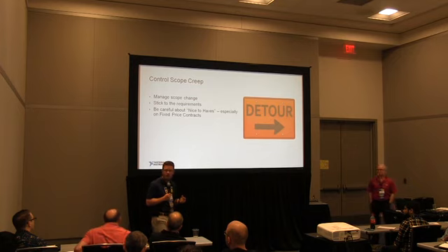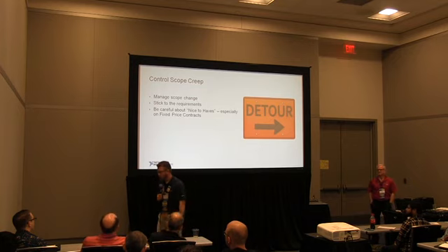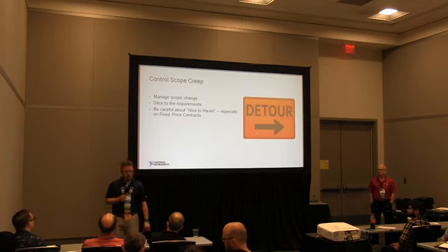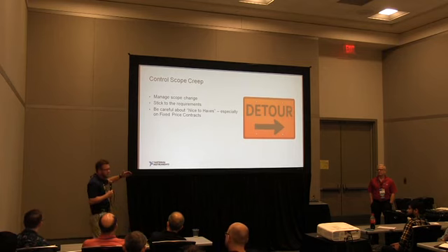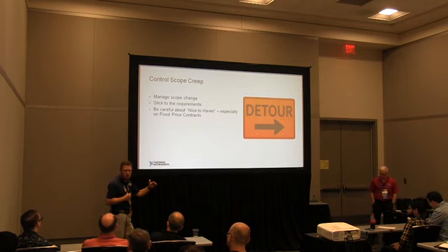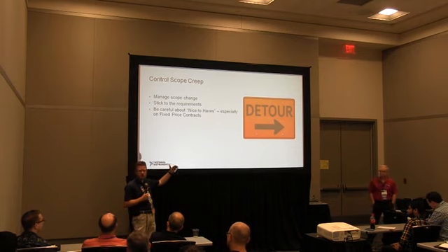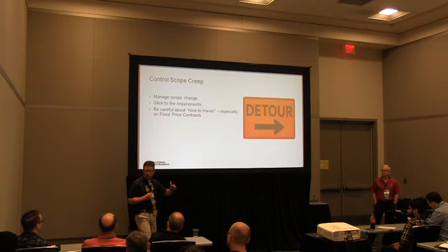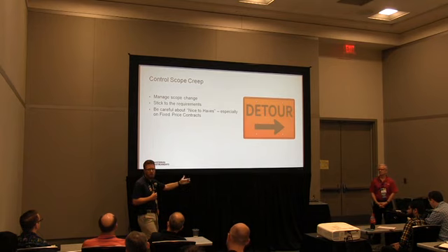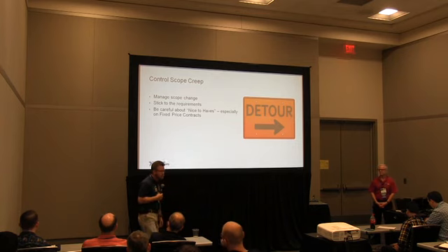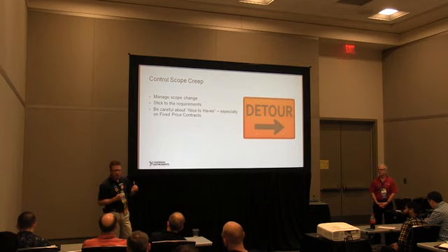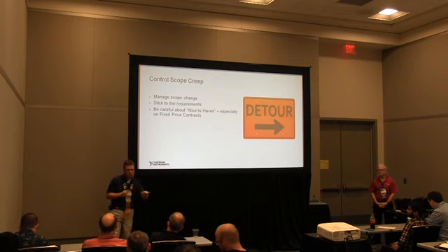And so this concept that I'm thinking about is, tell your customer, this is what it's gonna cost to do this work, but I'm gonna request for you to request 10% more. We're only gonna charge you this, but I'm gonna ask you to request 10% more. Because you're right, requesting budget once is easier than continually going back for project scope changes. So by doing that, it kind of streamlines the effort of getting a little extra money.